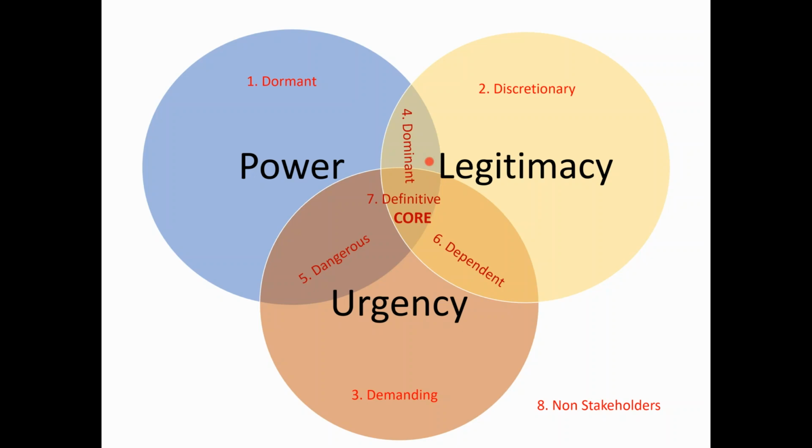Discretionary is probably the second last. So only if I have resources left can I, at my discretion, choose that. And demanding is even lower than that. He is just demanding. I am not supposed to be fulfilling his requirement. I hope you understand. Demanding is lower than discretionary.